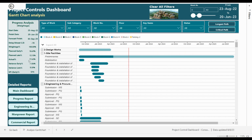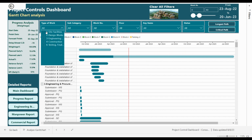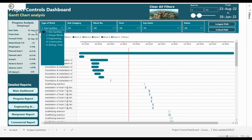This is the general information or progress analysis based on weightage for the engineering — we don't have any manpower allocation or cost allocation, so we have used the weightage. If we choose site facilities as an example, it should start 25 August and finish 25 June, with a forecast finish date showing minus 70 days delay. The weightage is almost 6%, planned early at 40% of the 5.75% actual, along with all the required analysis for this portion.